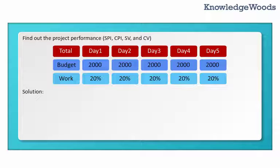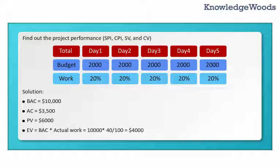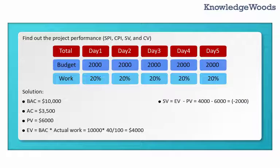Solution. Budget at Completion: BAC equals $10,000. Actual Cost: AC equals $3,500. Planned Value: PV equals $6,000. Earned Value: EV equals BAC times Actual Work equals $10,000 times 40 divided by 100 equals $4,000. Schedule Variance: SV equals EV minus PV equals $4,000 minus $6,000 equals minus $2,000.